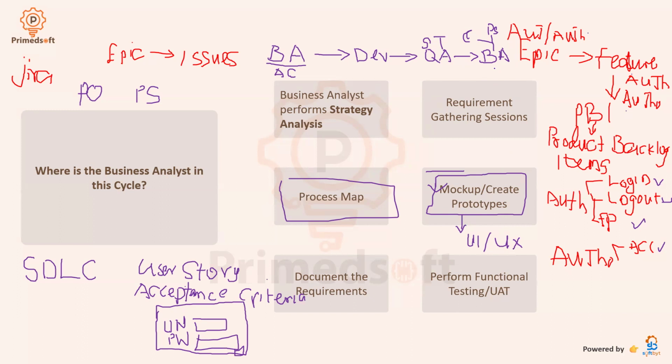What will happen is, okay, we have something working. Let us go and make it better. Does that make sense? So it also means that by the time you have committed to the sprint, nobody is changing it until you're done building. Nobody will come halfway and change it. When you're done building, remember you're just building bit by bit because we are working in an agile methodology, an agile environment. Agile is that you build the smallest part of it and improve as we go.